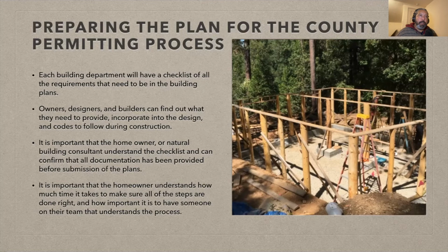It's very frustrating to be contacted by someone who just bought a piece of land and is ready to start building in spring, and it's January, and we have 3 months to get everything done. It's just not possible. So I always try to be upfront and say this is how long the process takes, this is the quickest, and this is the longest, and it's going to be somewhere in between. So understand that. Ask your county, ask your experienced builders.